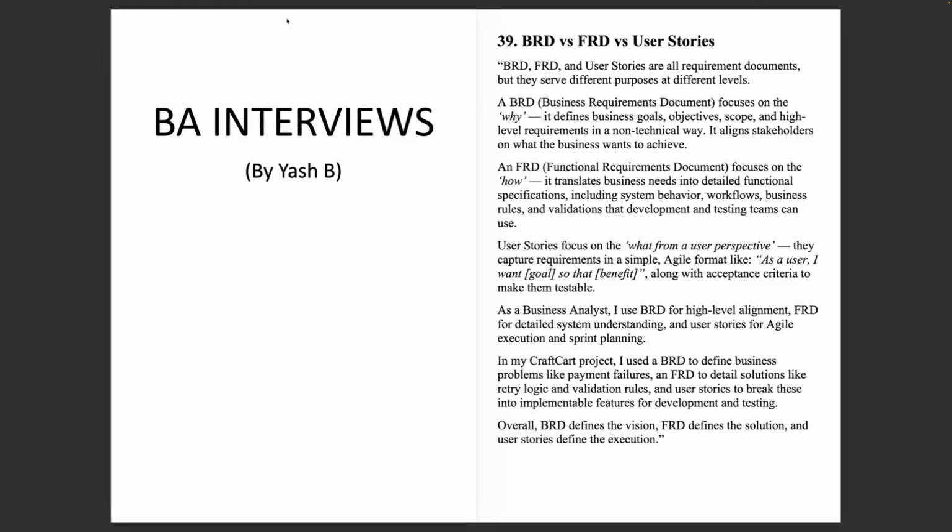An FRD, that's a functional requirements document, focuses on how. It translates business needs into detailed functional specifications including system behavior, workflows, business rules, and validation that development and testing teams can use.